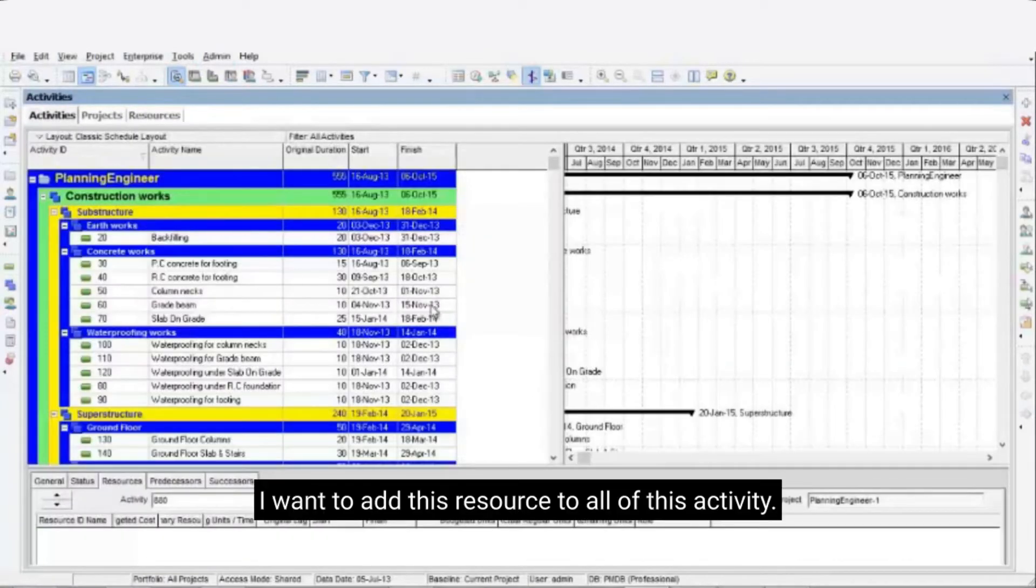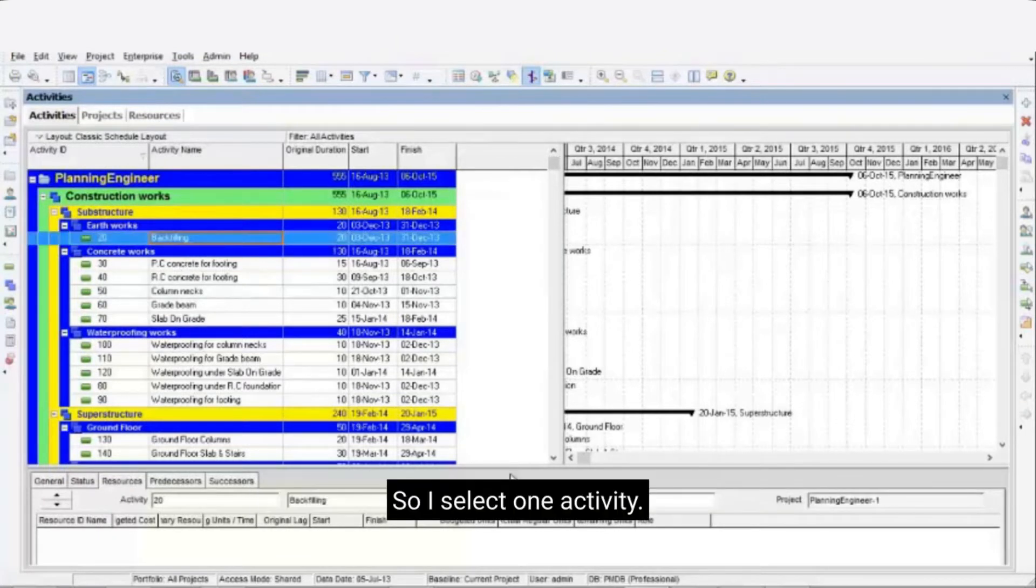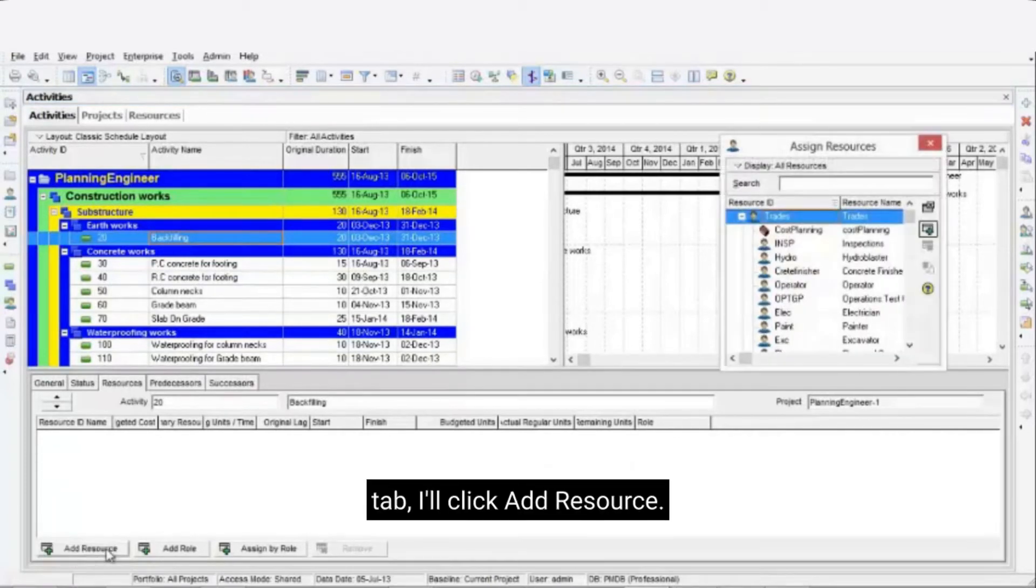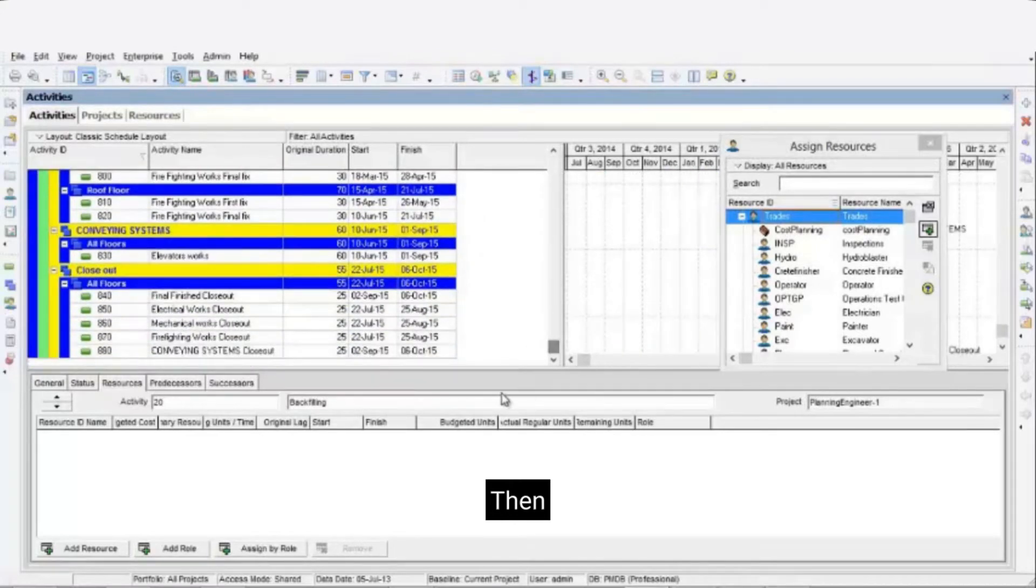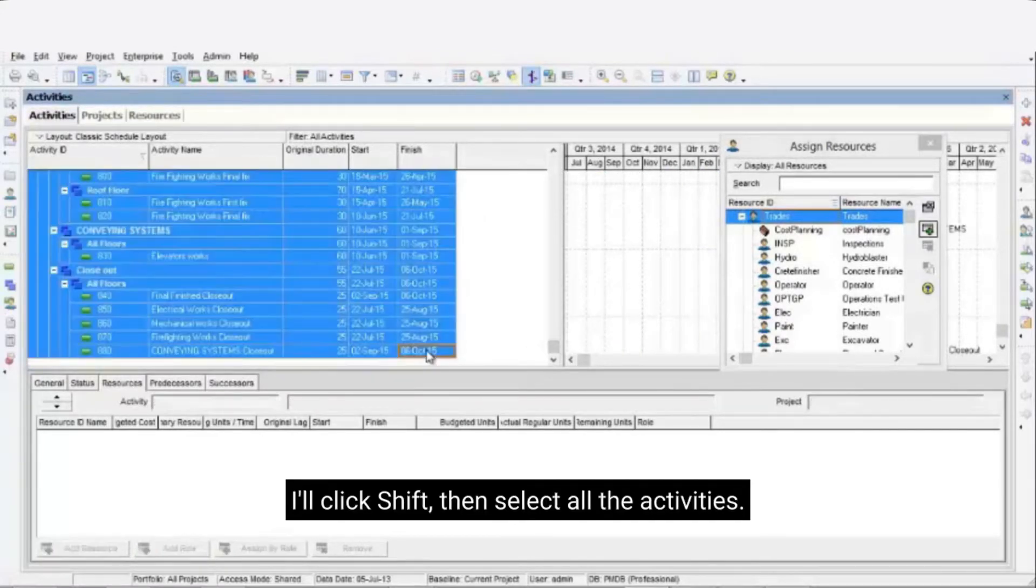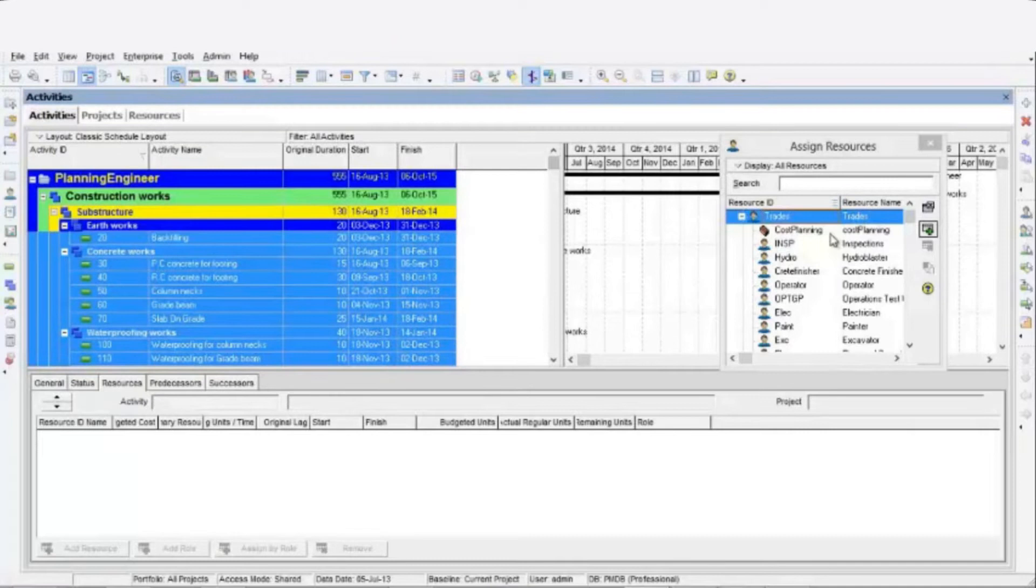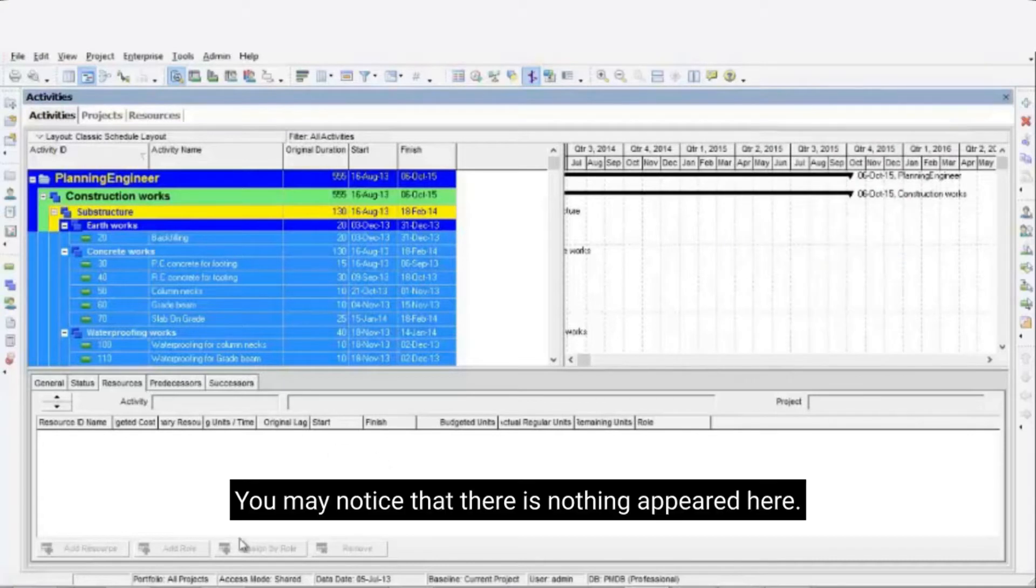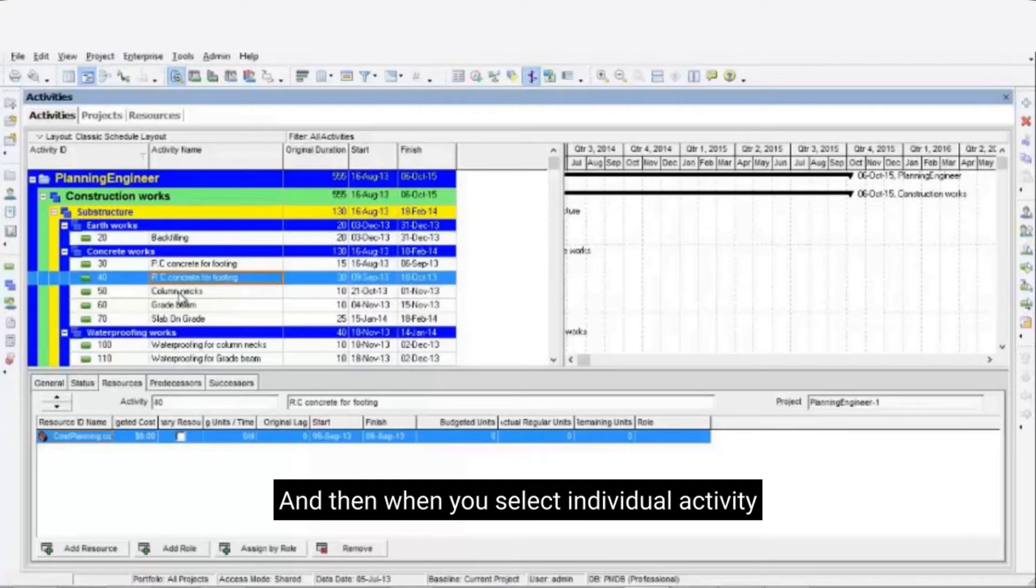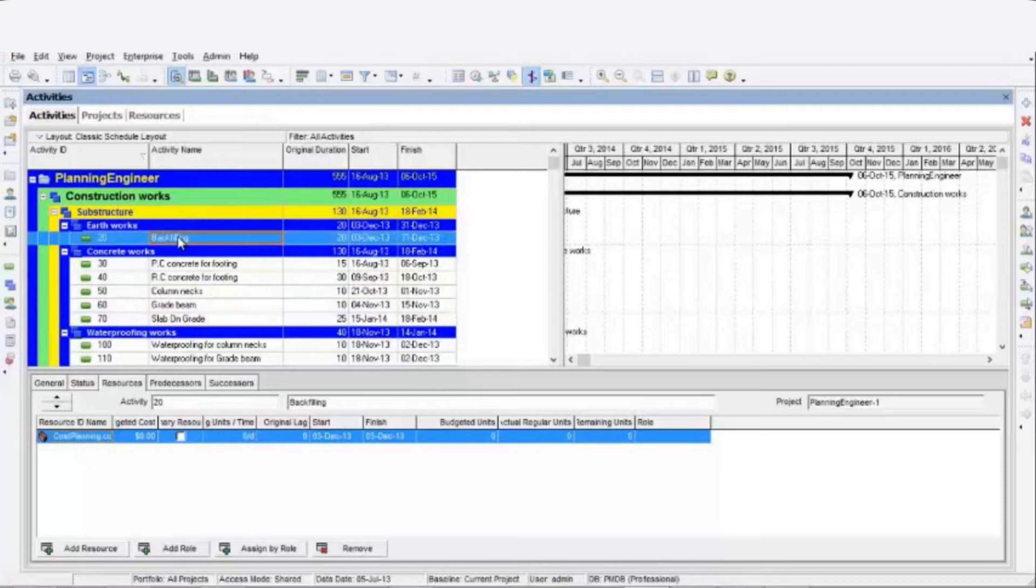I want to add this resource to all of these activities. So I will select one activity. Then I'll go to the resource tab, I'll click on add resource. Then, I'll click shift and select all the activities. Next I'll click on the resource, and I'll click on assignment. You may notice that there is nothing appeared here. Don't click it twice just click it one time. And then when you select an individual activity, you'll see that this one already assigned.